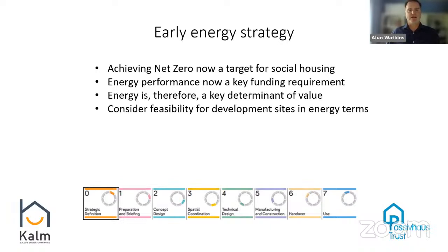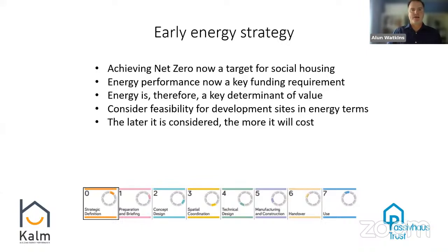So when we're looking at potential development sites, we really need to start looking at the feasibility with energy in mind. The later through the process that we actually start thinking about it, the more it's going to cost us, and potentially the less gains will be achievable.